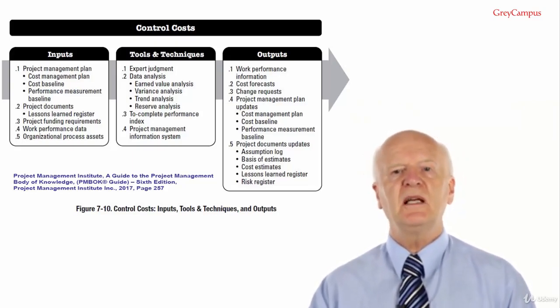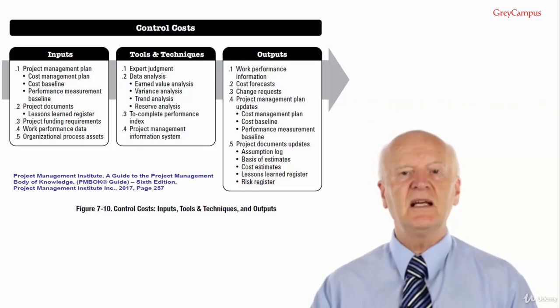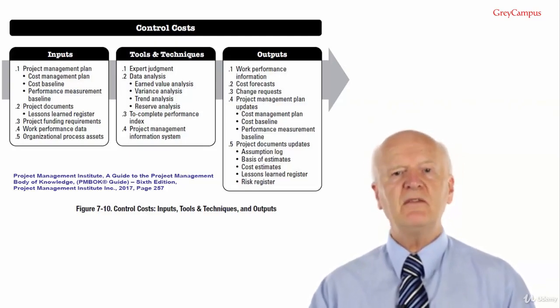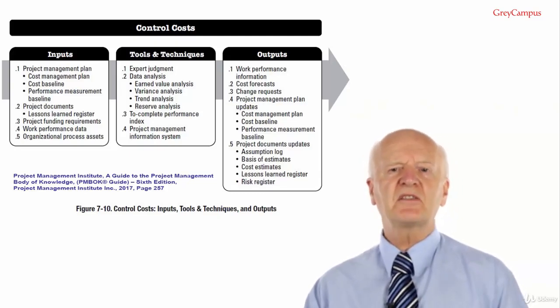Earned value management develops and monitors 3 key dimensions for each work package and control account: planned value, earned value and actual cost. Let's study these in detail. Planned value. Planned value, PV, is the authorised budget assigned to scheduled work. But what does that actually mean?